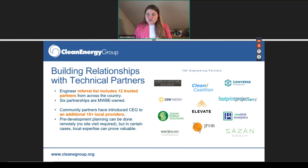I'll share 2 examples. We have a project in Hawaii that decided to work with a Hawaii-based organization, a technical service provider, and that has been really valuable as, of course, when you're getting out of the contiguous U.S., the prices for things, you can try to use the quoting from the national labs and the price estimates that they give for projects, but it can be a totally different story out in Hawaii. So the technical service provider actually gets quotes from, I think it's 3 to 5 different providers of solar and battery storage in the state, and then uses that and finds the happy medium, and that informs the report. So again, that local expertise there.